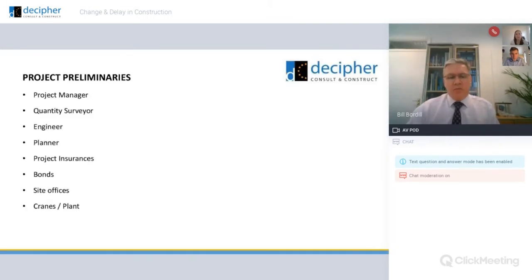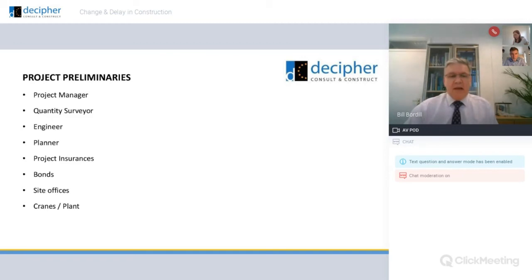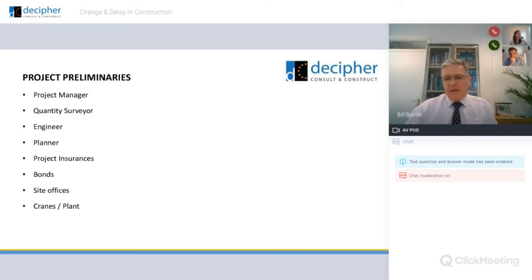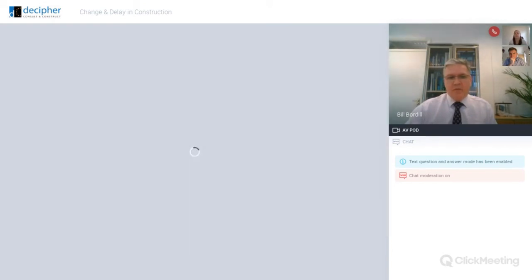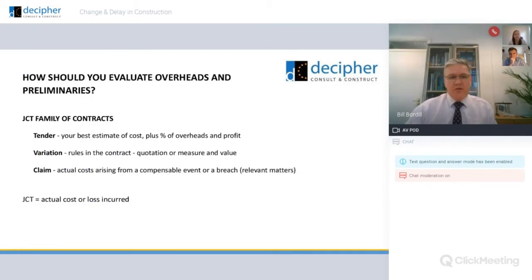So what are project preliminaries? They kind of mirror company overheads. You've got project manager — basically the manager and technical supervisory resource — bonds, insurances, everything that can't be directly attributable to a specific element of the project.